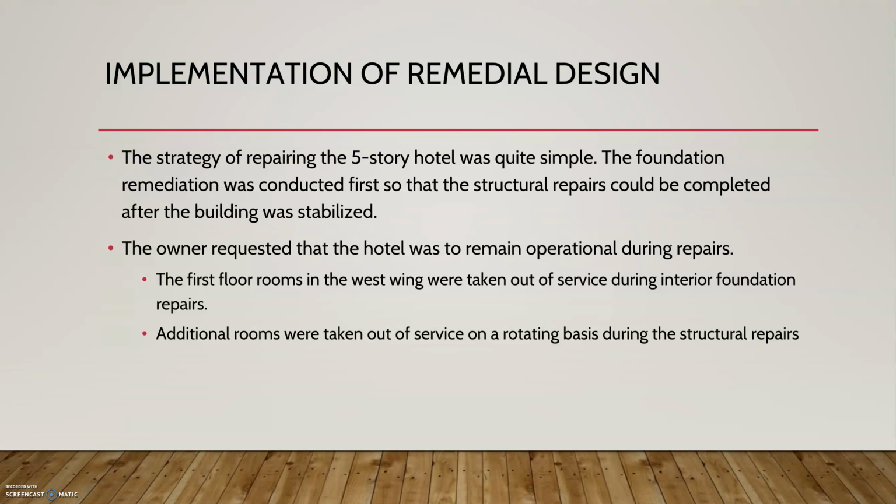So the first floor rooms in the west wing were taken out of service during the interior foundation repairs, and additional rooms were taken out of service on a rotating basis so the structural repairs can be done.